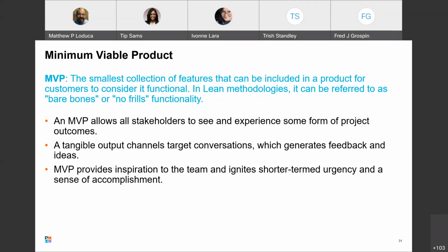If you have what you think is a minimal viable product and then it's like, well, we're not ready to release it yet because it doesn't have this and it doesn't have this, and at the end of the day, you're 90% of the way through before you deliver this, then they didn't really get that benefit up front. So this is what minimum viable product is all about: getting functionality right away and then getting more functionality incrementally along the way to make the product better and better and better, and see better returns on what you're doing.